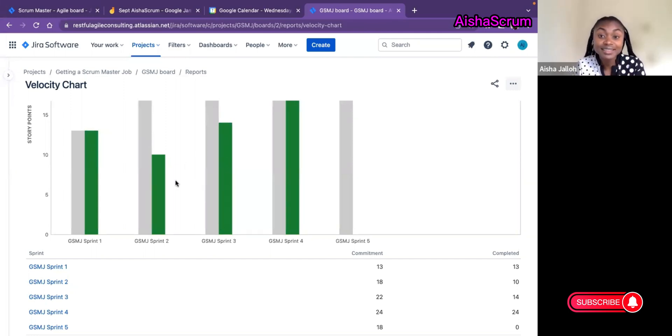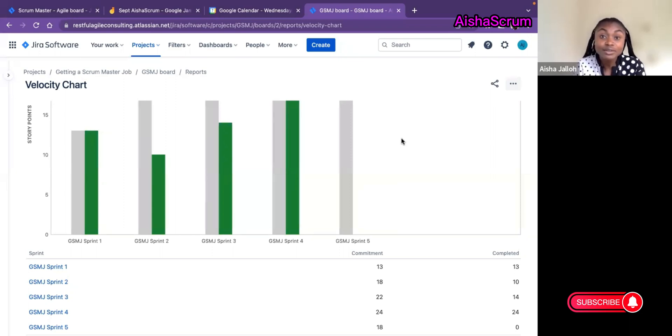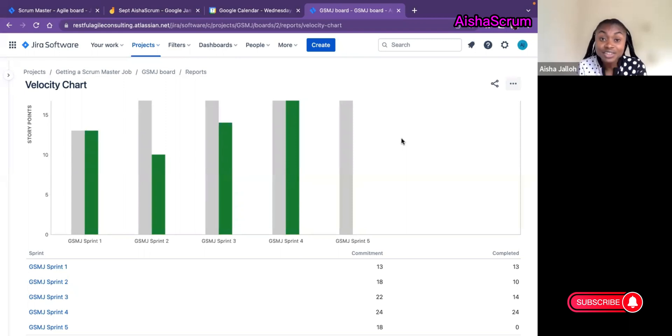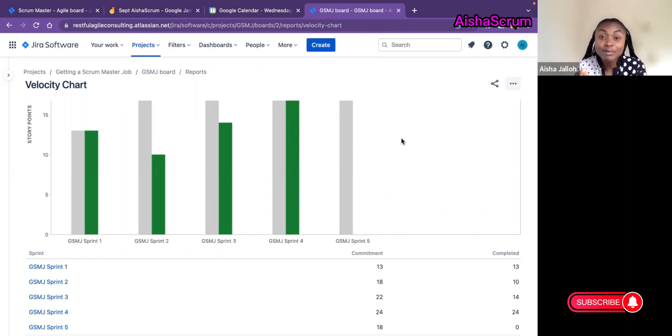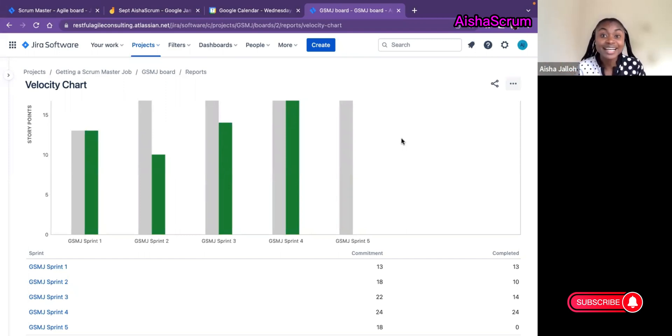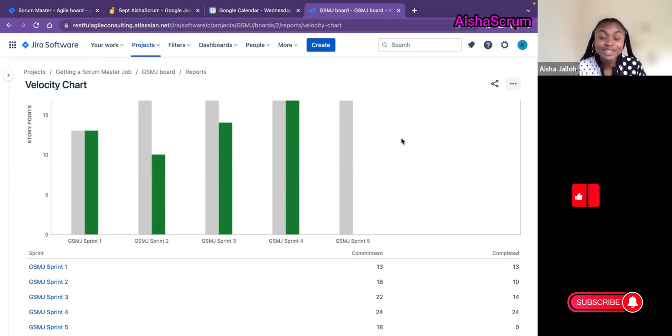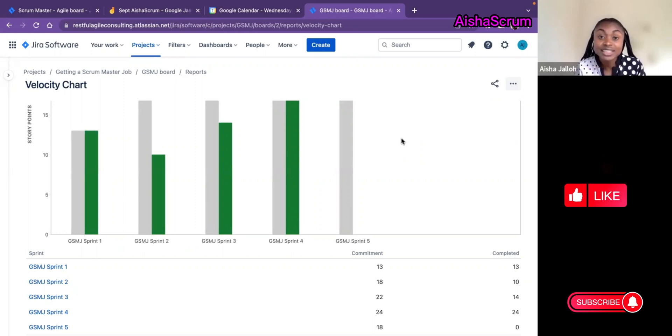Velocity is something sometimes you hear the leadership will ask a Scrum Master: how come your team velocity is still low? It's not something that's used in that sense. It's very important to know that if the team is given a good foundational place for them to thrive and learn to be self-organized and self-managed, whereby you are giving them the trust and you believe in them, slowly your team will get to that high performing state. Pushing numbers to them or forcing them to increase their velocity—a team can easily just tell you this story will take 80 story points. They can give it a larger number where at the end you're thinking they increased their velocity, yeah the number increased, but at the end are we delivering value? So that's why it's very important for us all to know that it's something that we use to predict so we can give estimates to the customers or leadership on how long it can take us to complete a work.